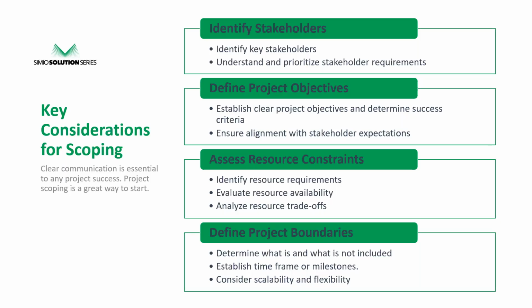But also, when you define the project boundaries in this last point, if a new stakeholder does come in, it can be easier if you already have those boundaries in place to say that is a great idea, and you're right, that objective is important. But for right now, for this particular project, that is outside of scope or outside the bounds of what we're going to be working on. So having that really clearly communicated at the beginning and defined at the beginning and aligned on at the beginning with everyone involved, it is critical.